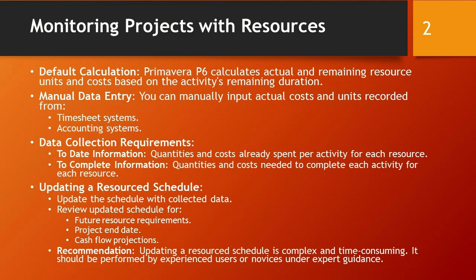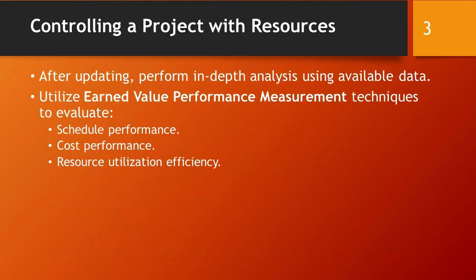When updating a resource schedule, it's important to update the schedule with collected data and review the updated schedule for future resource requirements, project end date, and cash flow projections. It is recommended that updating a resource schedule, which is complex and time-consuming, should be performed by experienced users or novices under expert guidance. Controlling a project with resources requires performing in-depth analysis using the available data after updating. Utilize earned value performance measurement techniques to evaluate schedule performance, cost performance, and resource utilization efficiency.